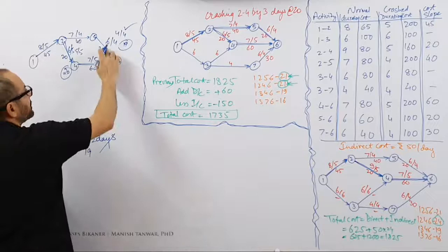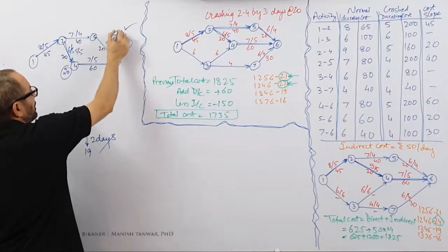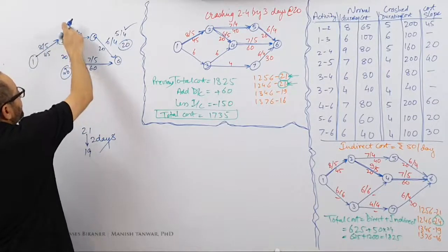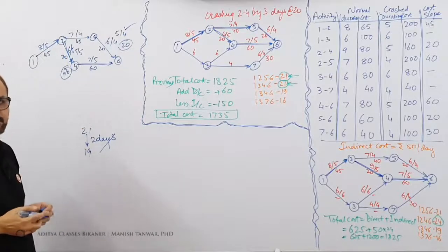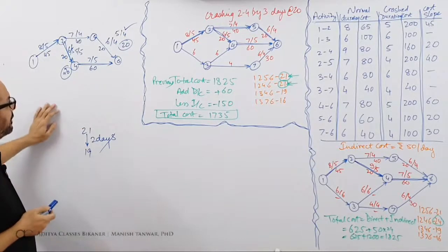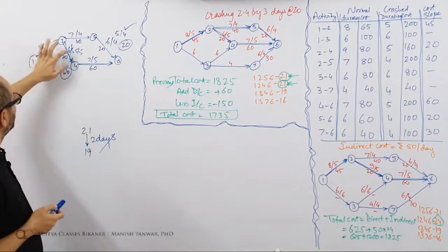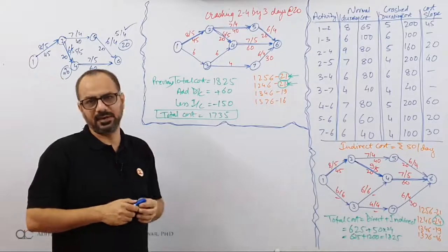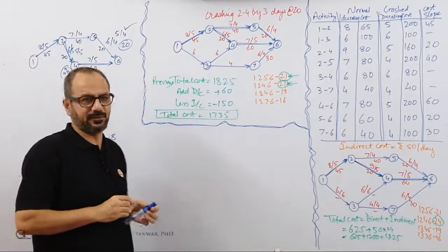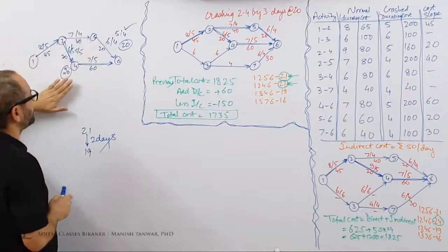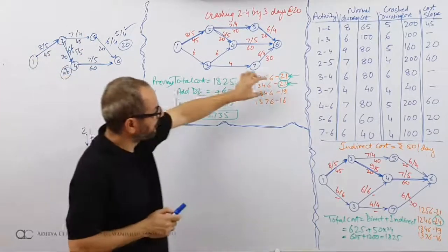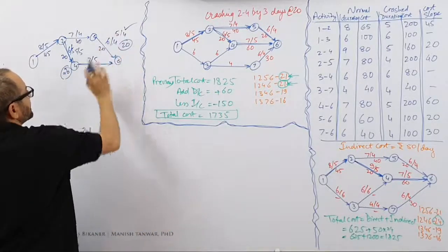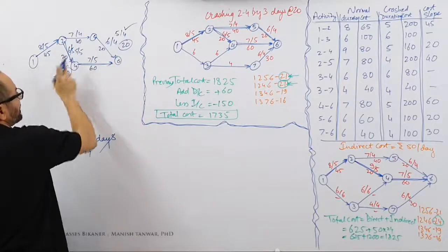So what I'll do is, instead of taking it down to 4, I'll make it 5. When you make it 5, it becomes 20. 8 and 7, 15, 15 and 5, 20. Fine. Then here we have 8 and 5, 13, 13 and 7, 20. So from 21 I have got down to 20. One thing has been taken care of. 21 is now down to 20. But the idea was bring 21 down to 19. How do I do that? Let me take a pause. This is acceptable. 6, 4 and bring this down to 5, 5.